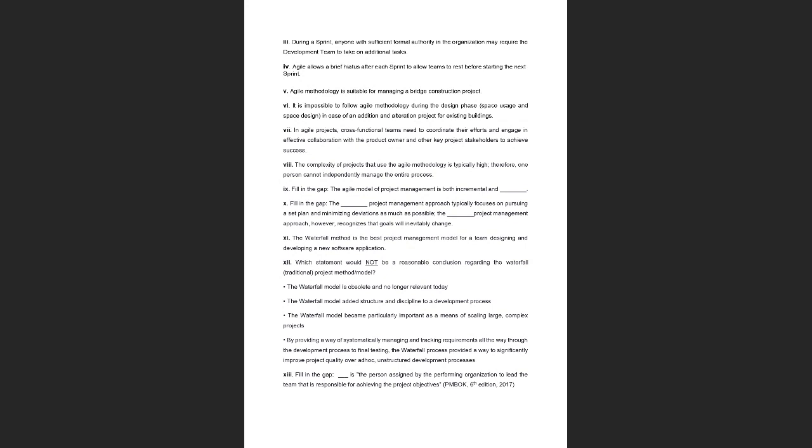Anyone else would like to try? True, false? I wish it was true, but the answer is false. In this agile methodology, you cannot take breaks between each sprint. Each sprint begins immediately following the previous sprint. That's why I was telling you that this principle is not applicable for all types of projects. This might be good for developing software packages, but if you're talking about, okay, anyway,